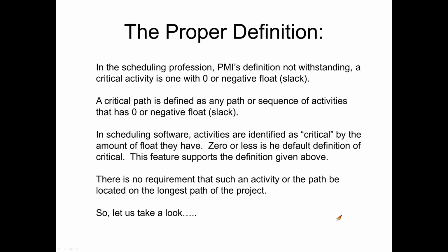In the scheduling profession, PMI's definition notwithstanding, a critical activity is one with zero or negative float or slack. A critical path is defined as any path or sequence of activities that has zero or negative float or slack.